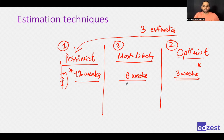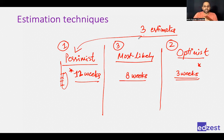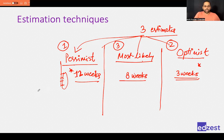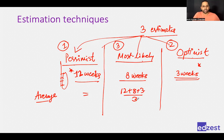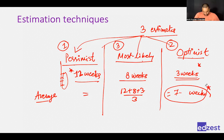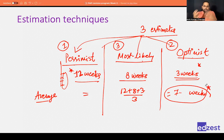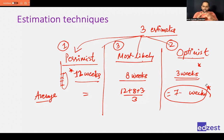So you have three estimates: pessimistic (12 weeks), most likely (8 weeks), and optimistic (3 weeks). You can take a simple average: 12 + 8 + 3 divided by 3, which is approximately 7.67 weeks. You didn't have historical information, but you have experienced people who thought about all scenarios — best case, worst case, and normal. This is a good estimate to have.